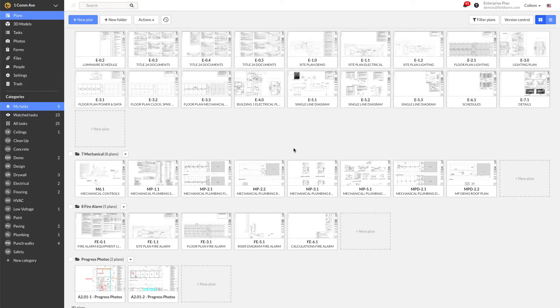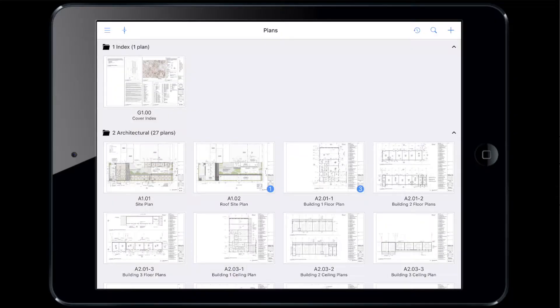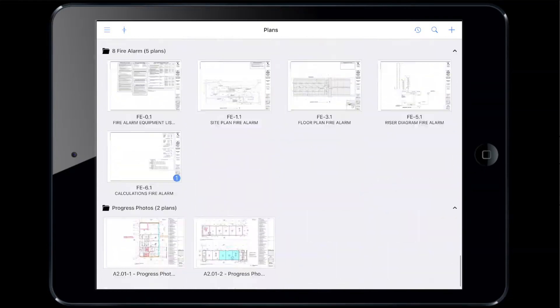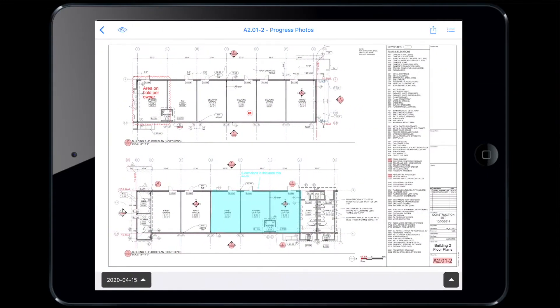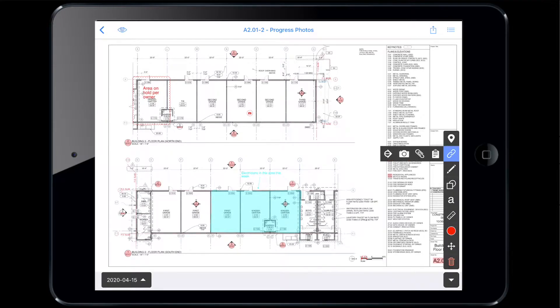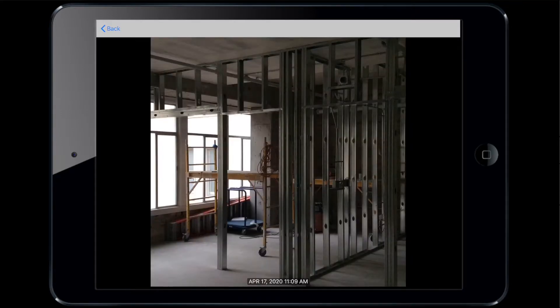Now that my plans are set up, I'm ready to head out in the field and take great progress photos. On your mobile device, scroll down to the progress photo folder and select the floor plan that you're ready to take photos of. Open up your markup toolbar and select the photo hyperlink. Tap the area of the plan you're going to take photos from, and then tap the hyperlink to start taking photos. Stand in one spot facing one direction and take a photo. Tomorrow, you'll stand in the exact same spot at around the same time and take a similar photo.